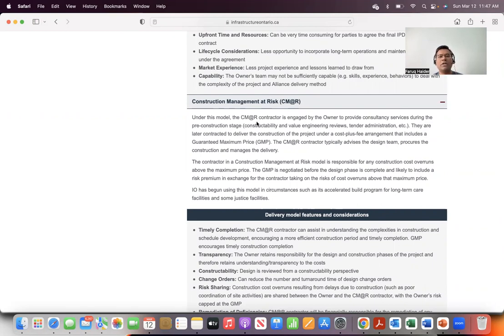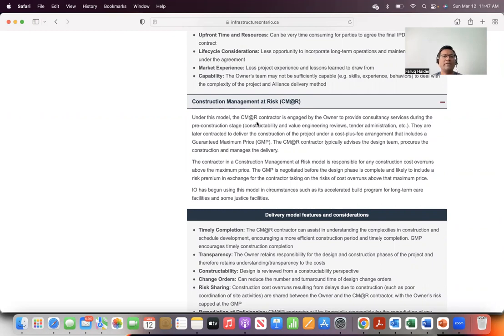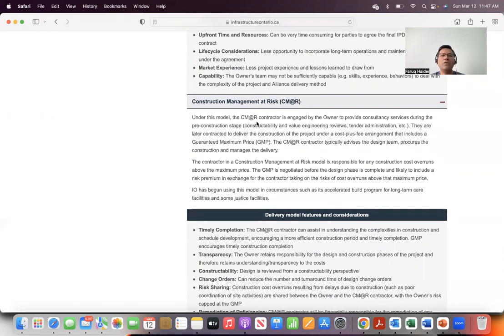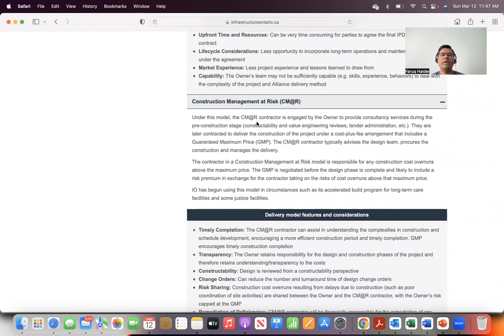That means before you start construction, this goes through constructability review, value engineering reviews, and tender administration. What is constructability? I have a video about that, so take a look at that. Constructability at a high level is to look at construction work that needs to happen and determine how we can make it more efficient, safer, who should be involved, how we should structure the work, and so on.